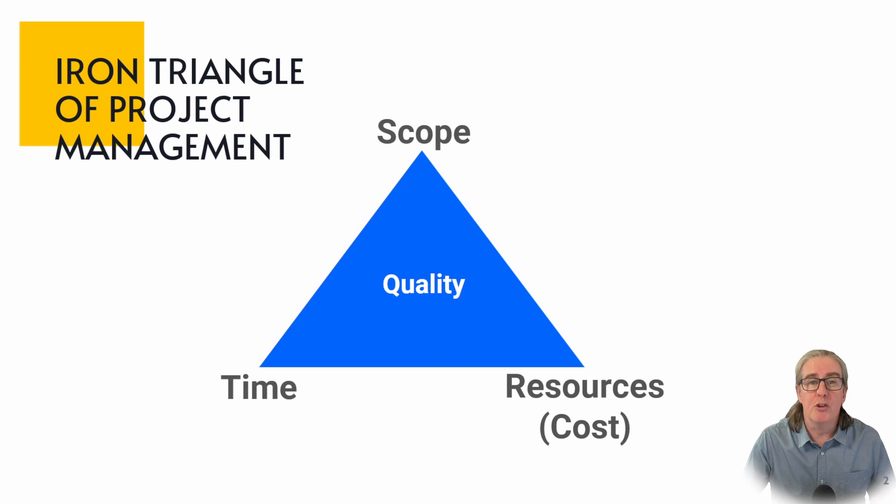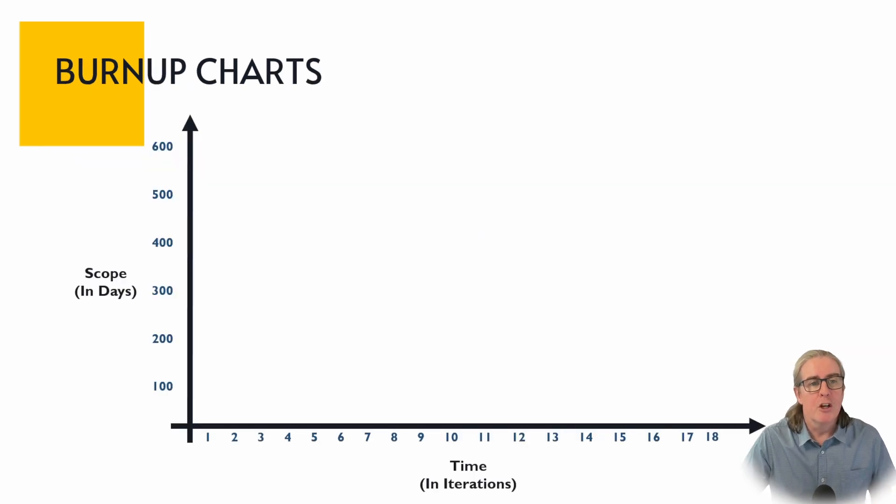So let's have a look then about how you can use these within a burn-up chart. So here's our typical burn-up chart. On the x-axis here we've got scope and we're calling that in days and in this axis we've got up to 600 days worth of work. On the bottom of the y-axis we've got time and here time we're calling this in iterations. Now iterations could be different depending on the organization that you're in. It could be weeks, it could be two-week sprints, it could be months, it doesn't really matter. It's that point in time when you're reflecting on the project to have a look to see how things have gone and where things are going in the future.